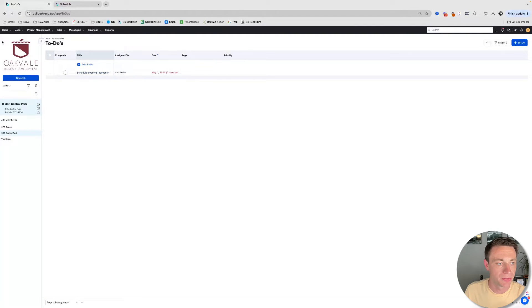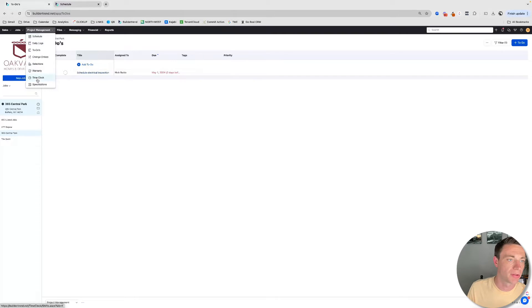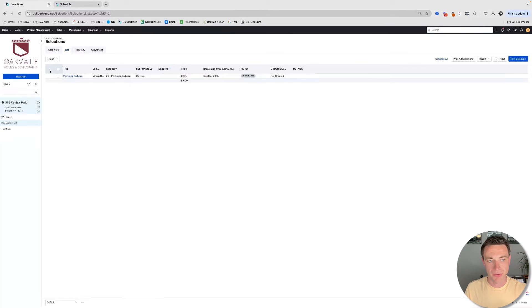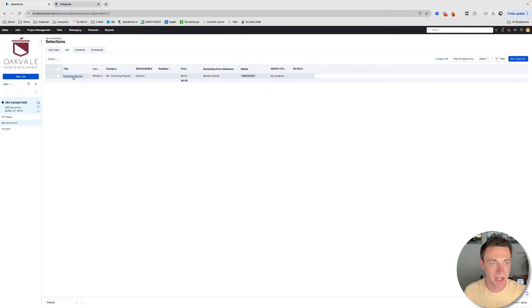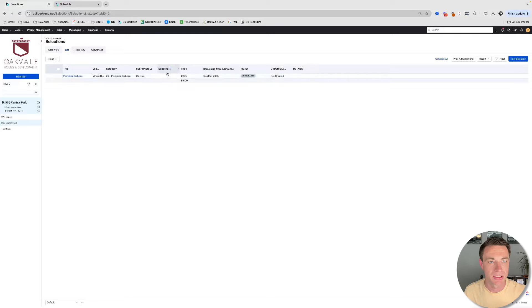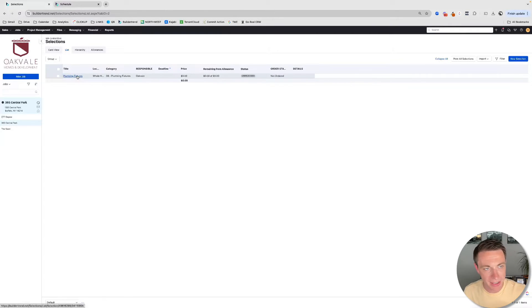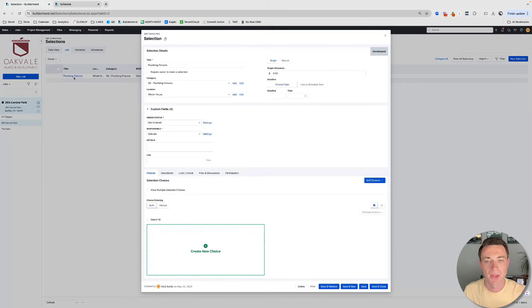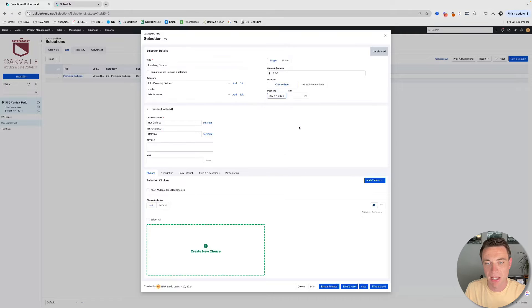Another thing we can do is we can make selections dependent on the schedule. If I look at my selections here, this is really great for helping a customer or yourself, your internal team, prioritize what selections we need to make and what time in setting deadlines. Try not to leave these blank. Try to have them. Even if you edit them and adjust them, try to have a deadline in there. So again, I can put a date. I can say, I need your plumbing fixtures selected by this date.